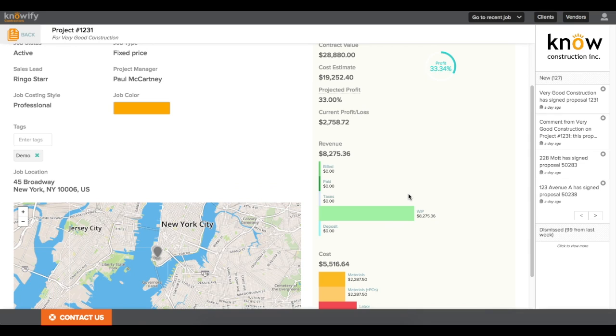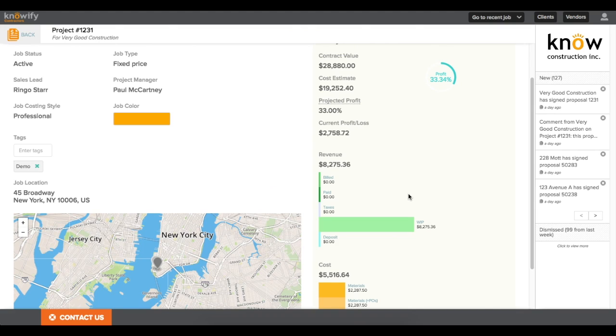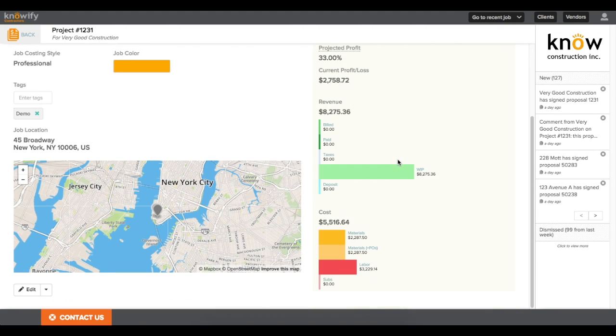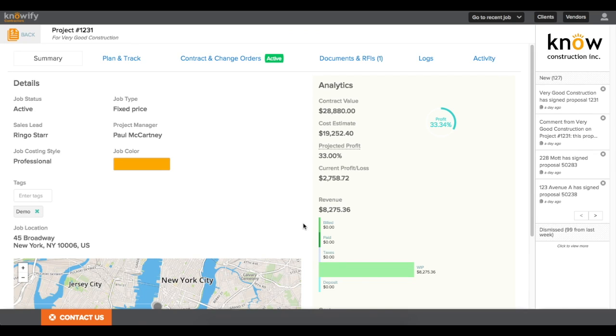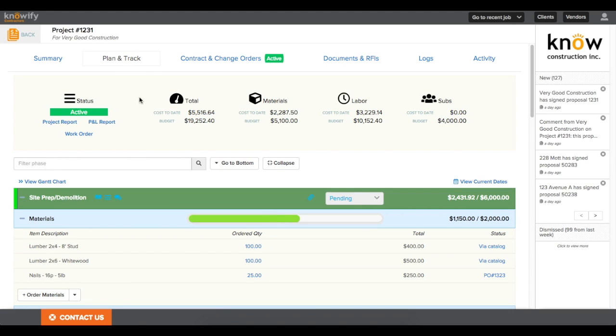The work in progress revenue you see is actually just showing earned revenue based off of the value of your contract times your percentage of completion. Basically, it takes how much you've spent on the project versus what you set up as your budget or expected final cost, and it shows you how much revenue you should be invoicing based off of how far along you are. So it shows you a more real-time profitability using all of this info.